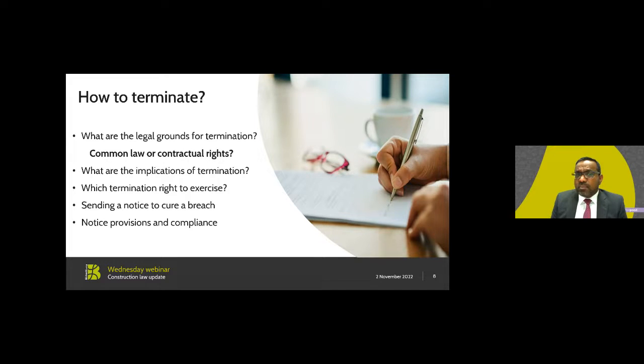You need to consider what happens with materials on site and with the site itself. What duties would arise following termination, particularly what must the parties do in respect of confidential information or personal data or other documents. What other contractual duties and accrued rights survive termination, and whether it would be more profitable to continue the contract. Another factor is how the termination would affect staff.